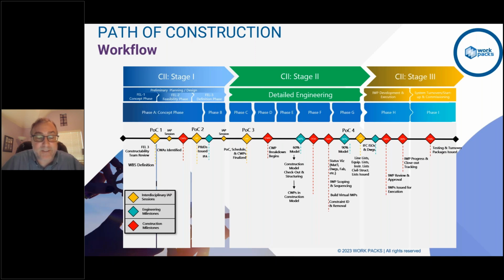And then you start having these discussions and the interactive planning sessions to bring everybody together. And then you refine that, right? So you have these sessions, the team goes away, they do their work, you come back and you refine it again, right? So you're looking at the path of construction and getting successively more detailed and aligned amongst your stakeholders in terms of how the project's actually going to be executed, to the point when you get past the POC3, the path of construction, the third event,